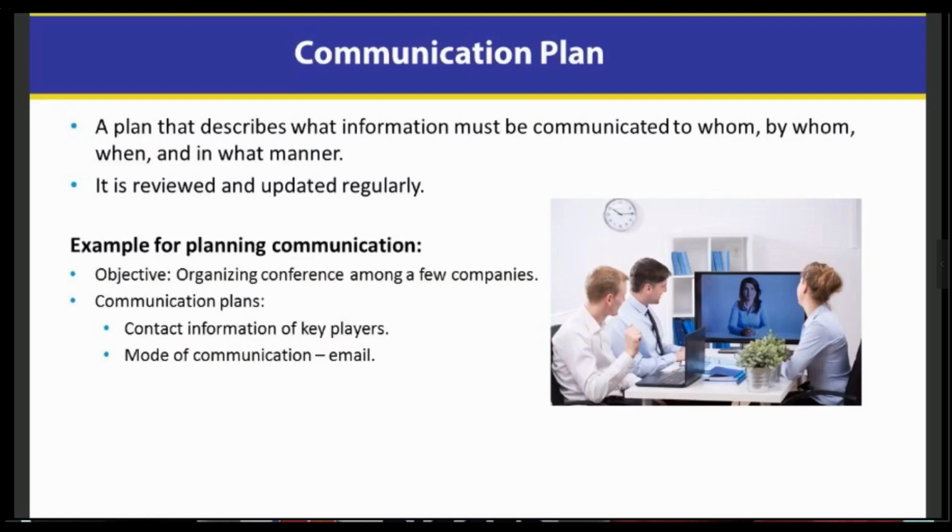So a good communication plan helps us organize ourselves and make sure that the key players on the project team have the information that they need in order to do their job. That may mean that you would prefer an instant message and then somebody else may prefer something else. Now that doesn't mean to say, as a project manager, I can't suggest certain things. For instance, I love pull communication, where I put something out somewhere, I tell everybody where that's located and give them the methods to get there, whether it's a computer or an internet connection or whatever, and then allow them to go get the information that they need. And I'll suggest that, and if everybody's okay with that, we'll move forward.